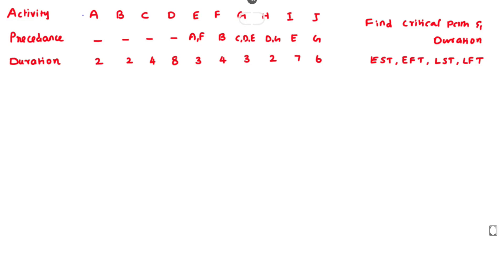Hello friends, welcome to Civil Engineering Exam. Today we are going to see a problem related with construction planning and scheduling in the topic of Critical Path Method. The network path containing the maximum duration is the critical path, and that duration is called the project duration. Activities A, B, C, D, E, F, G, H, I, and J are given along with their precedence relationships and durations.